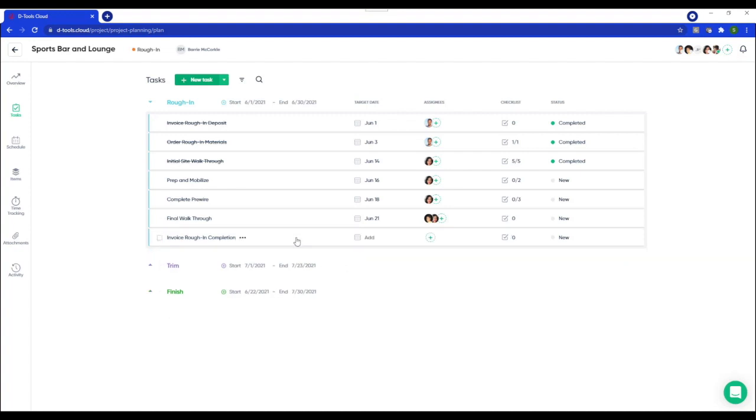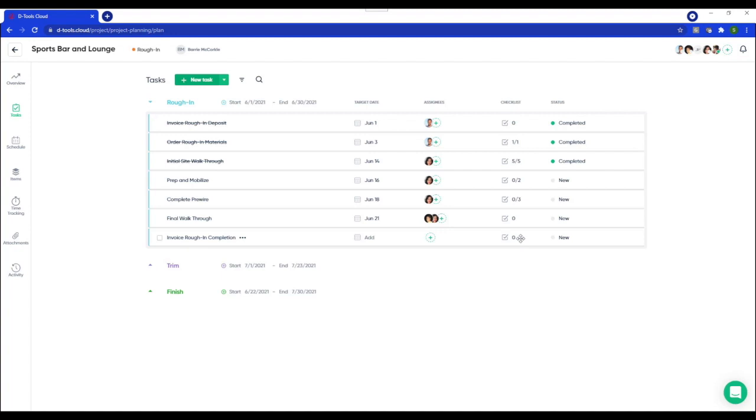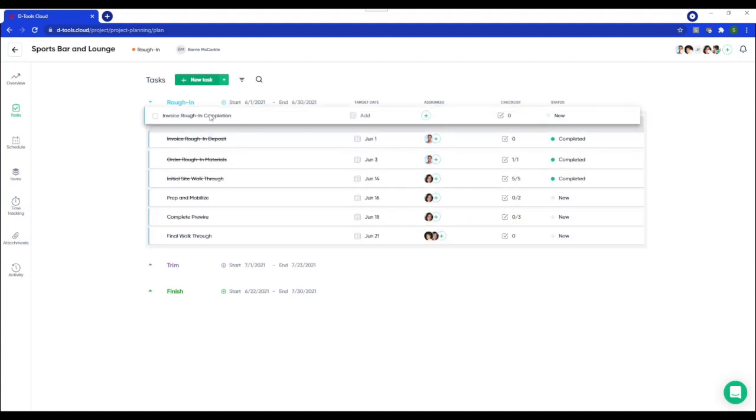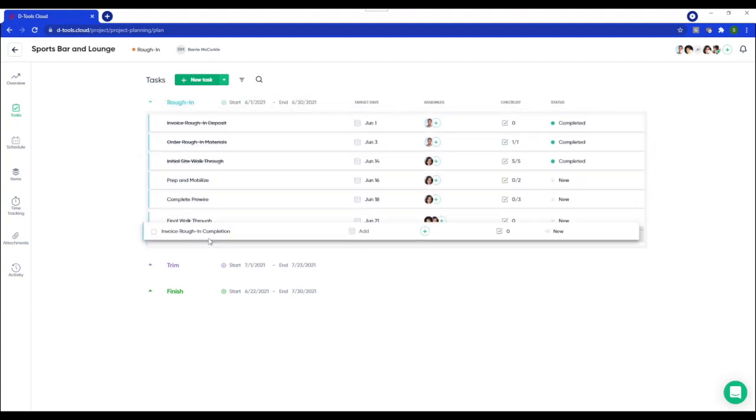Again, please keep in mind that you don't have to get this granular with your tasks. It's just my preference. The task can be as simple as mount TV and hook up sound bar. So just add a list of what needs to get done. Now at this stage, you could add a target date if you'd like. If you know the resource that's going to fulfill this task, assign it now. You can also create checklist items and think of checklists as subtasks. There are a list of additional items that you can provide to help boost success when your technician's in the field. So create your project plan. And then you can also reorganize these tasks at any time just by dragging and dropping. And I just love doing this.